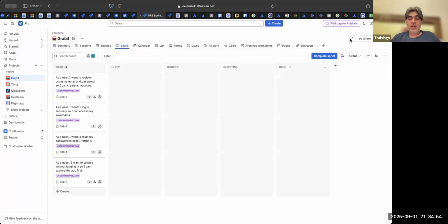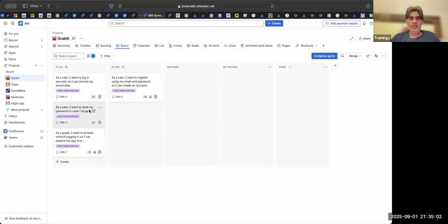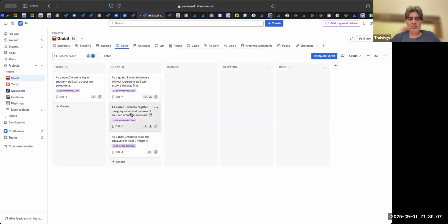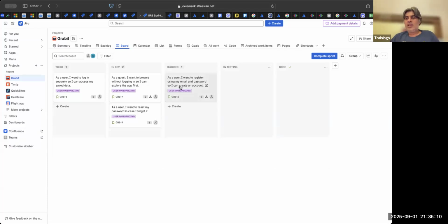One other concept I will tell you, but after we complete this concept. So let us say this is in dev, this is in dev, this is blocked. Why does this become blocked? On day 3, somebody says, boss, we needed 2 APIs. Instead of 1 API, we now need 2 APIs. But the second API, we need it from some other team. So what to do now? And that API, we missed to find out in the grooming call.